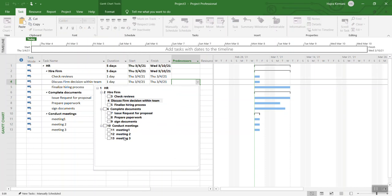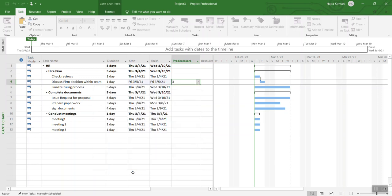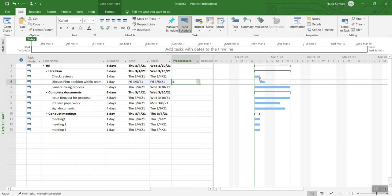If you are using a different version of project, it doesn't matter. You can just type in the number. I'm going to select number three over here because that's the dependency. Then you are going to see that the Gantt chart on the right hand side is changing. It's now displaying the dependencies as well.